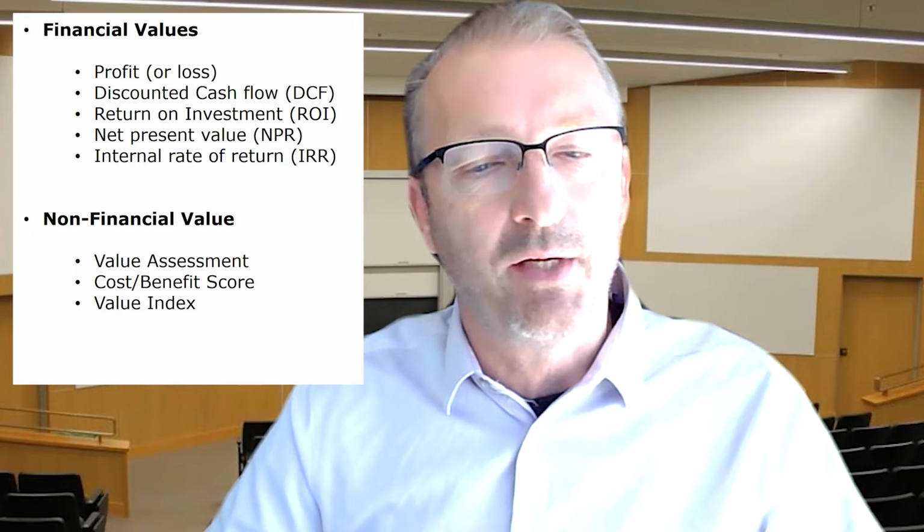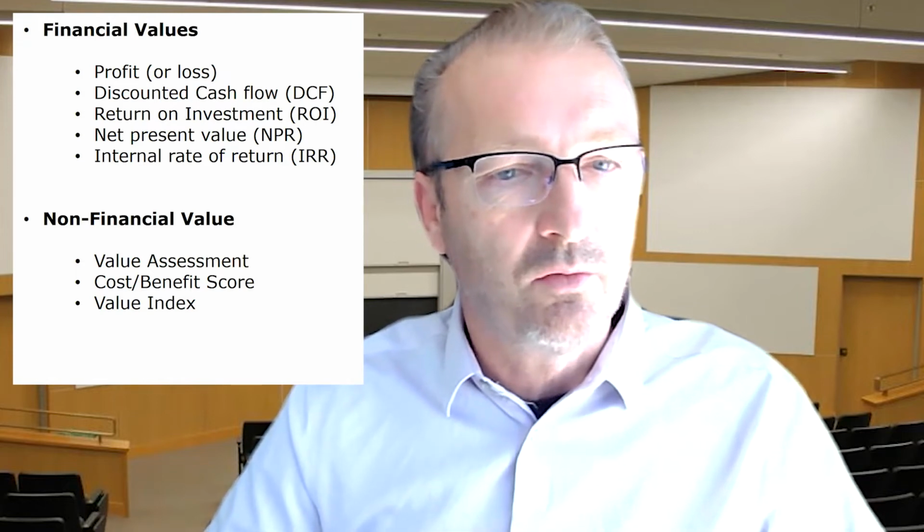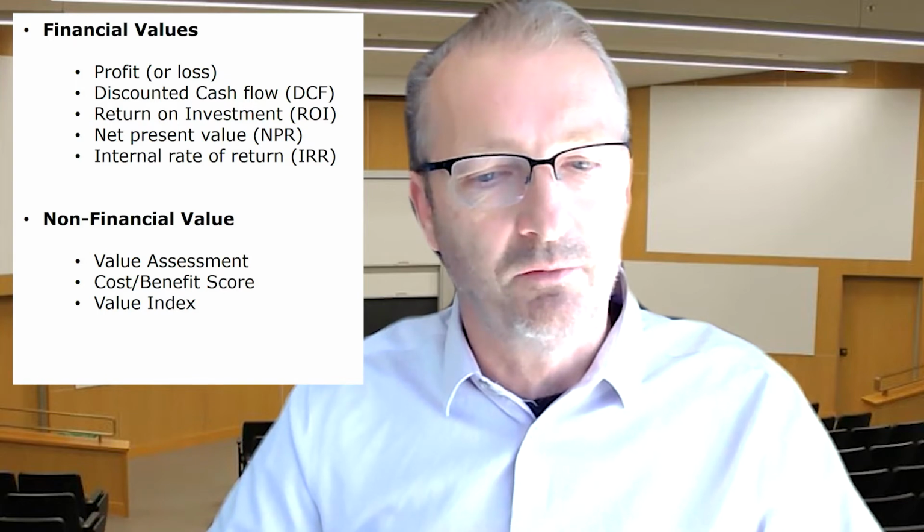We can look at a return on investment. Return means the profit over the cost. We can look at a net present value, and we can look at an internal rate of return. There's a few other ones, but those are the standard financial value estimations of the net value of the proposal or the initiative. Now, there are also non-financial value estimations.